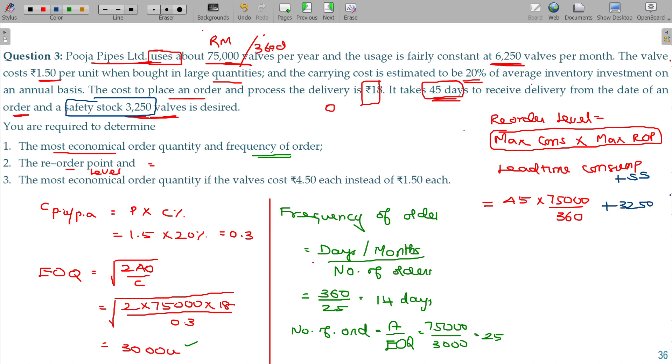Normal reorder level formula: maximum consumption times maximum reorder period, lead time consumption or reorder period consumption. Lead time - you have to wait for these days in order to receive. So lead time consumption plus the extra safety stock. By adding this, what is the reorder level here? 12,625 units.